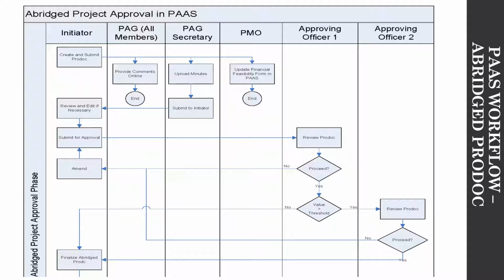This is to complete those fields that were not required at step 3, to update the project budget and project documents with any further comments or with changes that have just been revealed, or in case there is a change in the budget or change in scope after negotiation or final agreement with the donor that allows for that to happen.